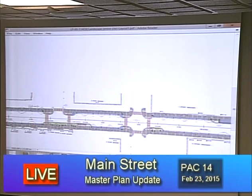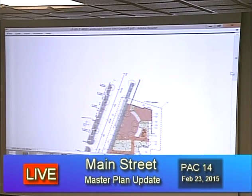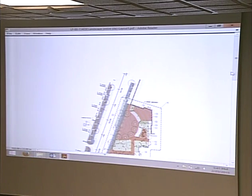If we can pan up North Division Street just a bit. There we go. At the northern end of North Division Street by Church Street and US 50, one of the change orders that we discussed and approved was to extend the planning area all the way up to the intersection with Church Street, and that would include a planted area or a bioretention area on the western side from the last parking space or around there up to the intersection with Church Street. Is that included in the plan now, or will it be? It will be in the 90%. By the time the change order came across our table, there wasn't time to get that into this drawing set. So it is on the drawing table. Okay, great. That included the changes to the lanes going out onto 50, correct? That's correct. The road diamond. Yeah, the road diamond. Excellent.